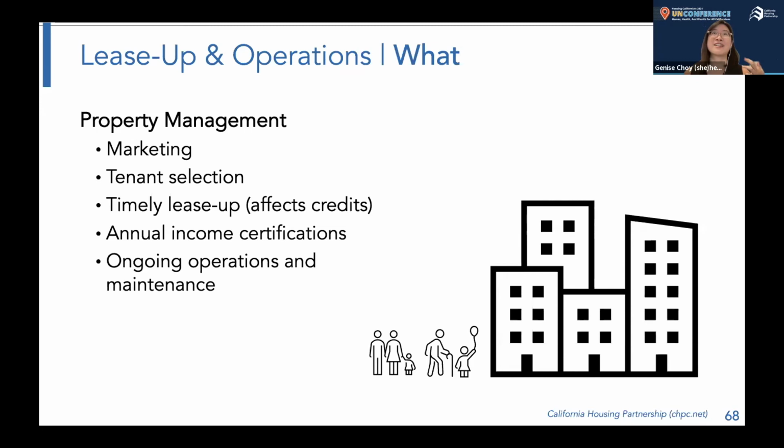One of the things that I've seen a lot of as a project manager was that we would try to implement these new technologies for say energy efficiency that frankly were more complicated than your old steam heater or whatever to maintain. And over the course of operations, maintenance was not as great as one would have hoped, and we weren't seeing the energy efficiency savings that we were expecting because we just didn't coordinate well enough with property management to make sure that they understood what was needed to maintain these systems.